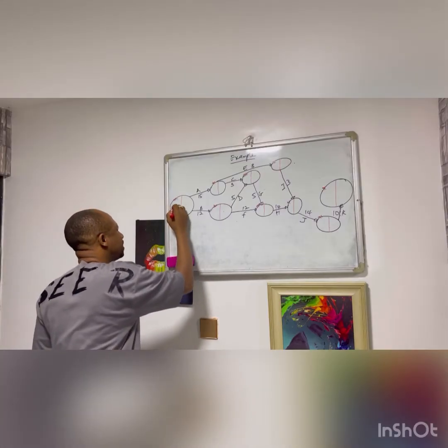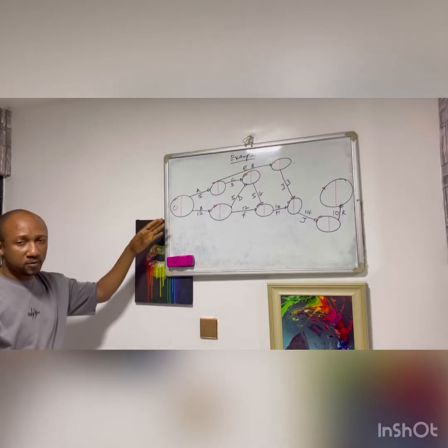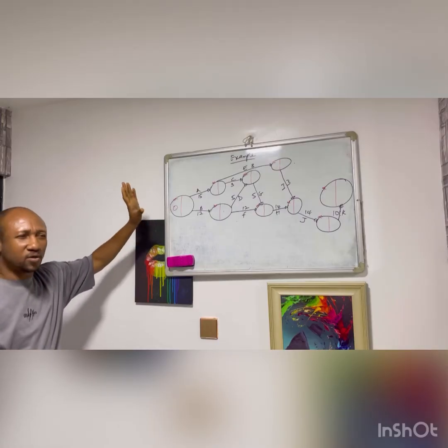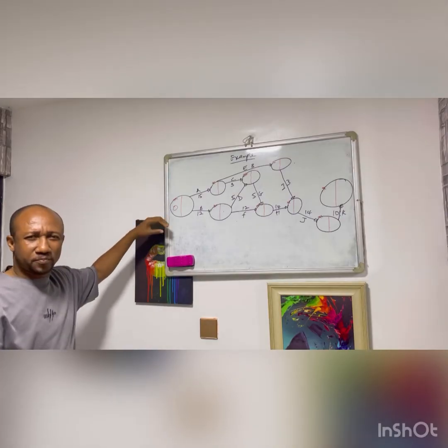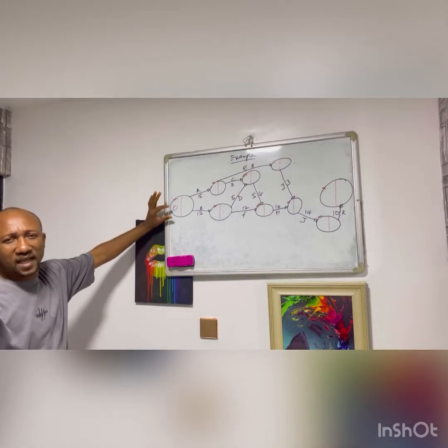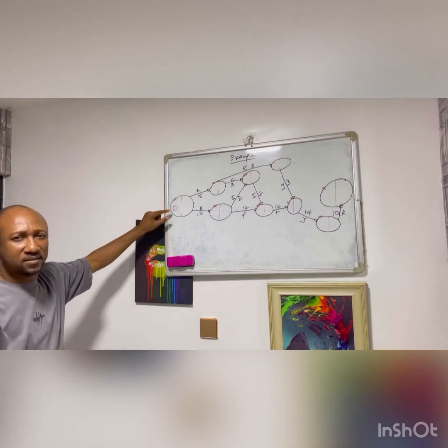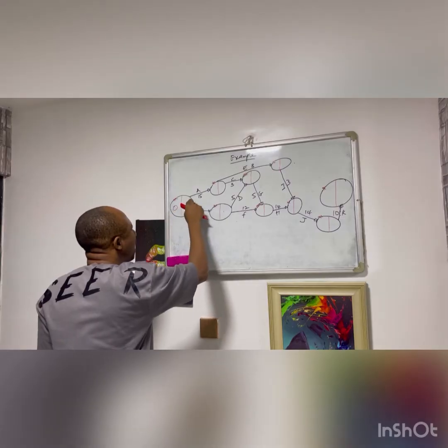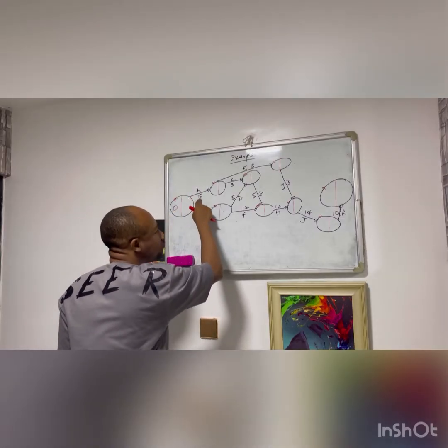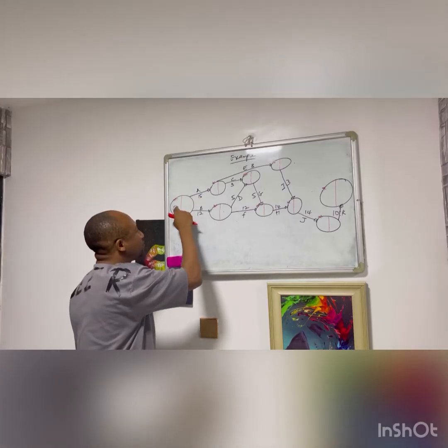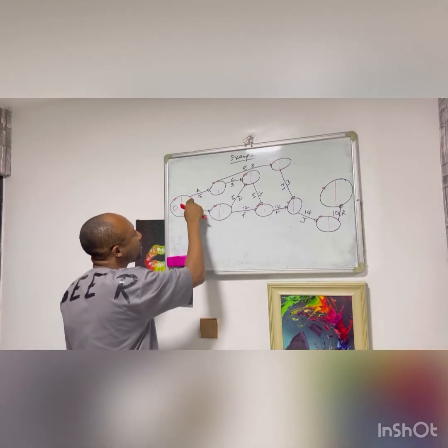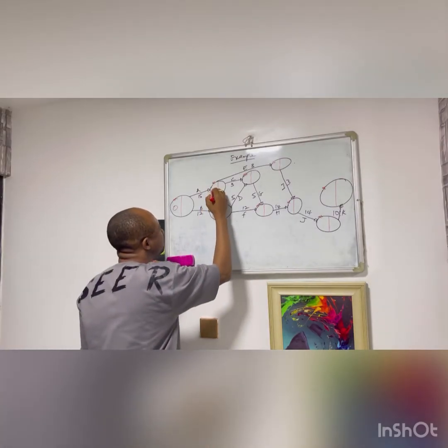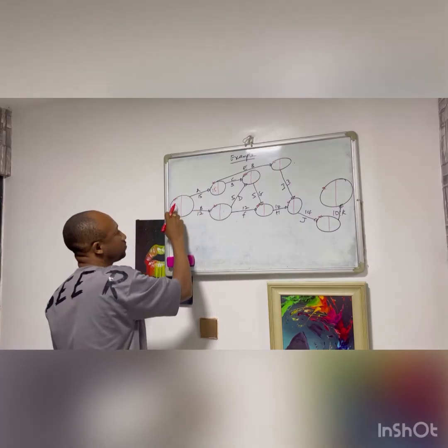And then I will start here with zero. The commencement of the project is assumed to be zero. It is not only assumed to be zero, it is zero because time has not started yet. So activity A is commencing in week 0 and will take 15 weeks. If we start on week 0 and it takes 15 weeks, by the time activity A is arriving here, 15 weeks has already passed. So I'm adding what I have here to what I have here.